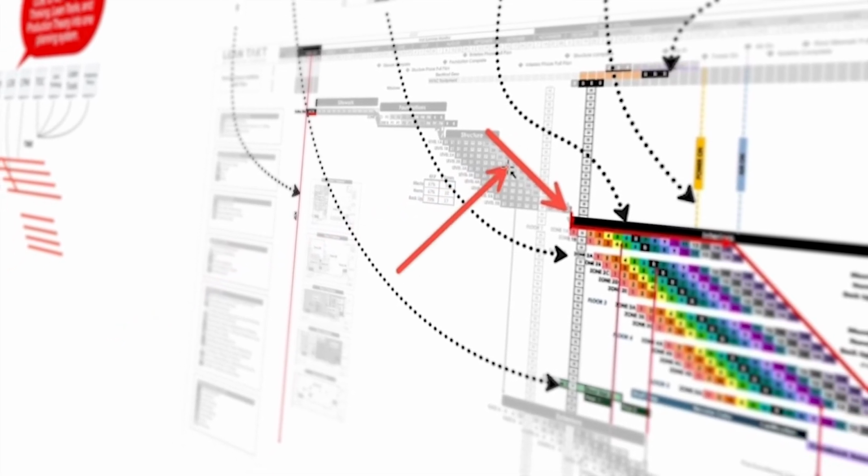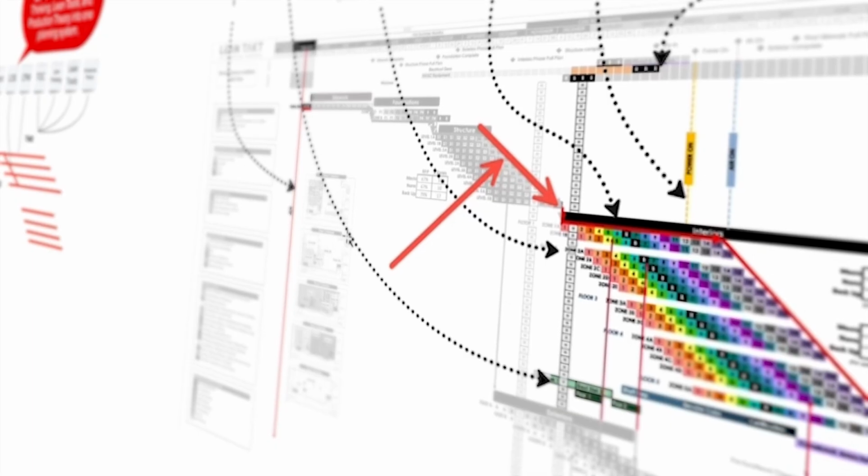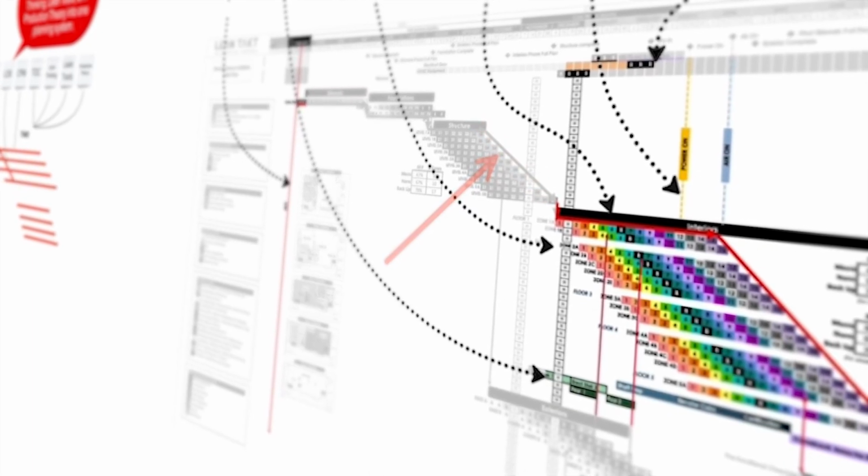You have your activities shown in a way that we're used to from left to right, like we do in Gantt. You have your line of balance for all of the phases in the Takt format itself, right? We're able to see the path of critical flow or critical chain, which is an actual working method of doing a critical path. So we have the best from CPM. You're able to see inside the production plan either trade bottlenecks or zone bottlenecks. So we have the theory of constraints.